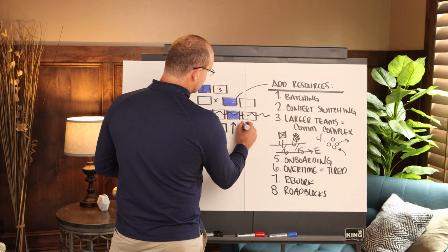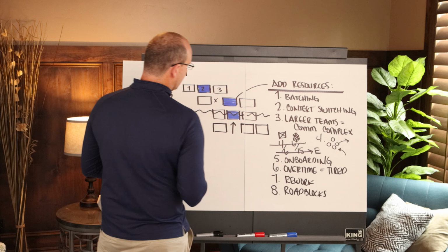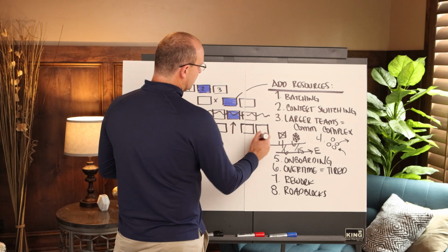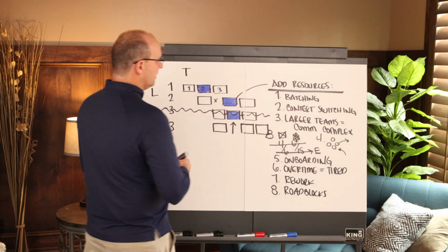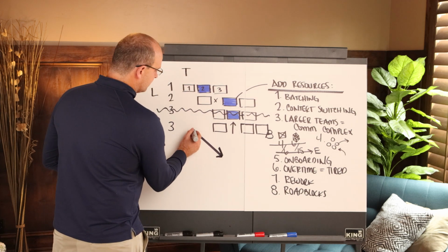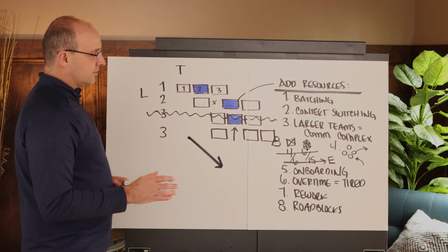We should have cascaded that out to where we absorbed that and we had a nice flow from there to the impact to here, because we had buffers at the end that we could use. And that trade flow is the single most important thing in construction from a productivity standpoint. So this is called the Bungee effect.